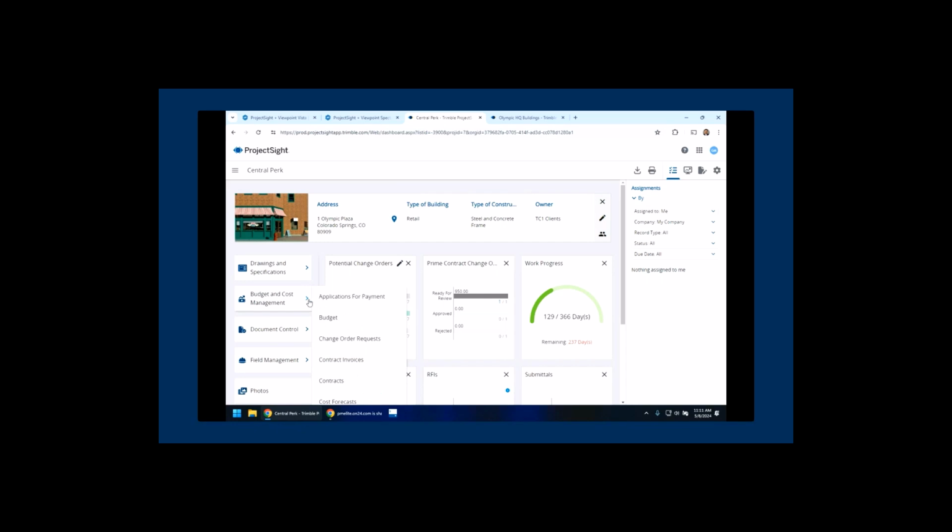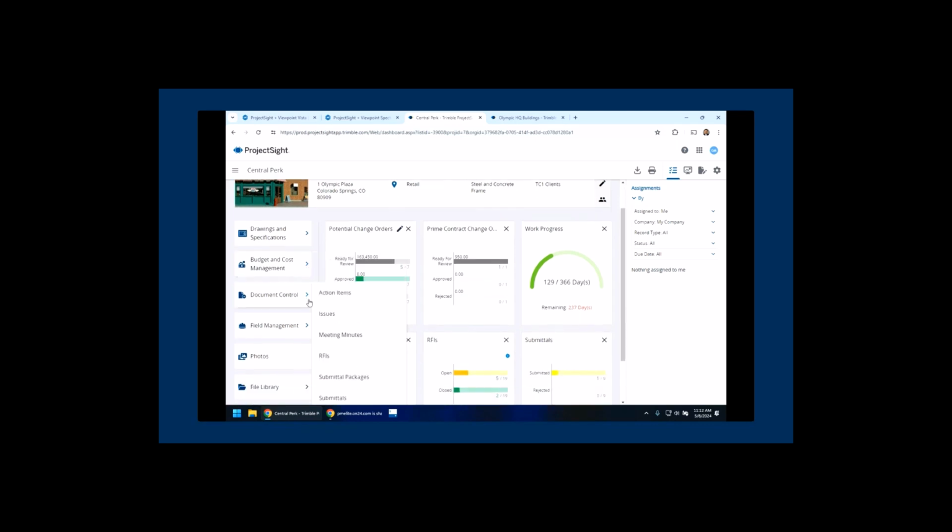But also connected in with that is a fully built out budget and cost management solution. This allows for this budget to be set up here or in the ERP, right, depending on your particular workflow. It also allows for commitments, meaning subcontracts, purchase orders to be issued here, or for those to be created here from the integration. They originate in the ERP based on another workflow. And you'll see more on that when we connect next week with Alex, who's going to take us through supplier exchange, which is great for any MEP contractor who is looking for local distributor pricing from their suppliers to help them generate purchase orders. So all of these connections here, the budget, change order requests, contracts, contract invoices, all of that detail relates directly to what's happening on my financials for this project.